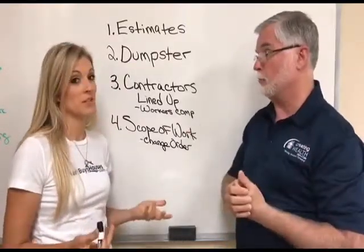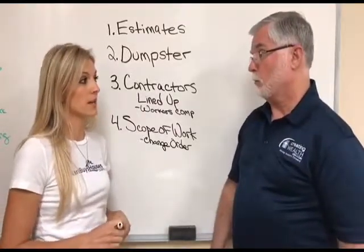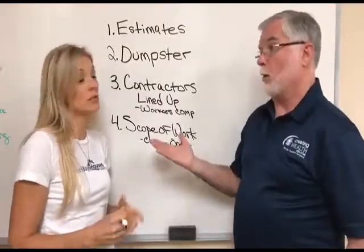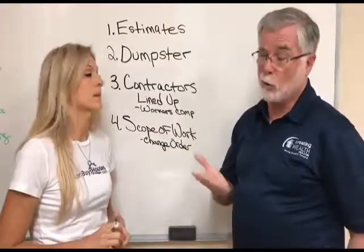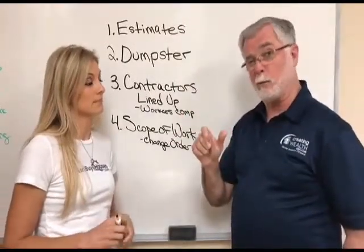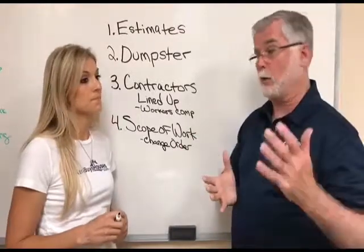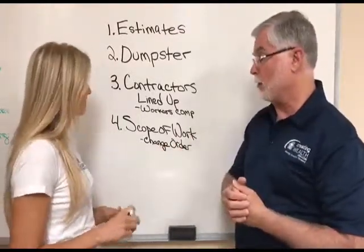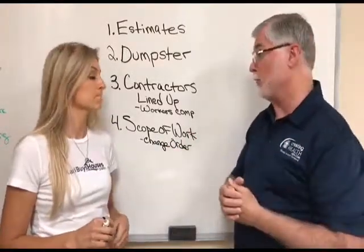Sometimes they're required. Pretty much every project we do, there's always a change order, because there's just something that we forgot to add, or something that I want changed, or we don't realize. Or they open a wall, and there's something that nobody could have anticipated. So that stuff can come up, which is why in your budgeting process, you should always have a little bit of a cushion, usually 5%, in the event that there's a surprise. It'll help you cover that extra expense. And in the event that the expense doesn't come up, that just gives you a little extra profit.